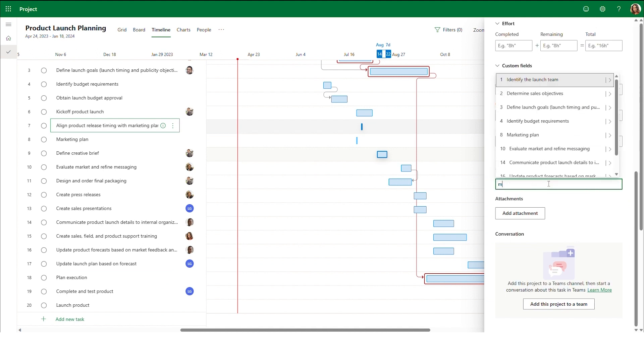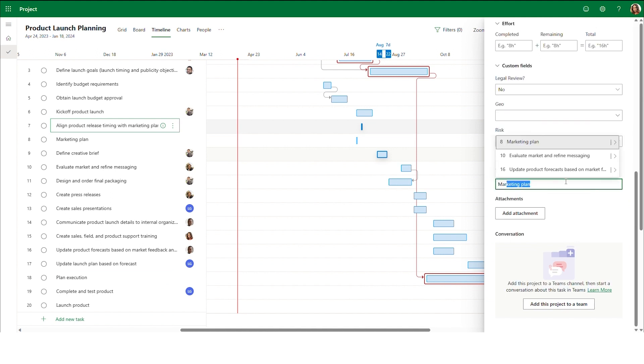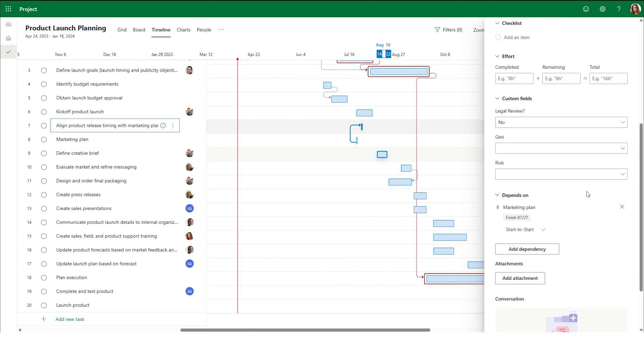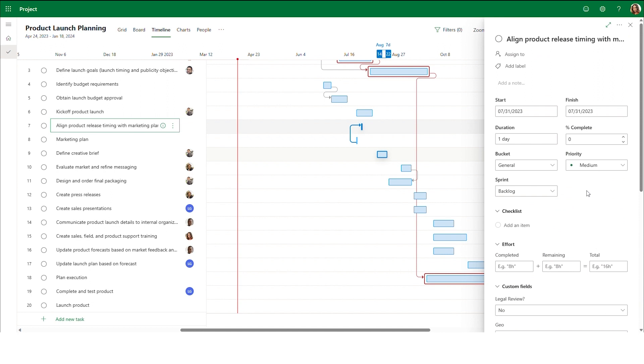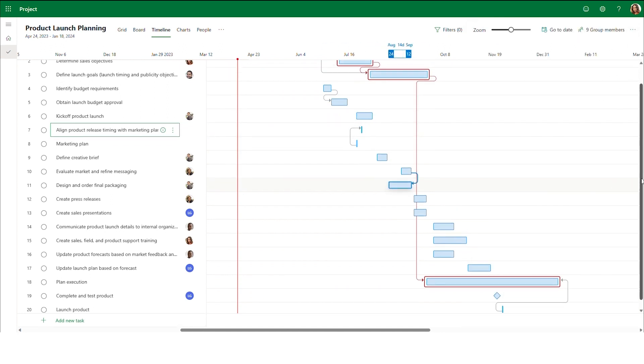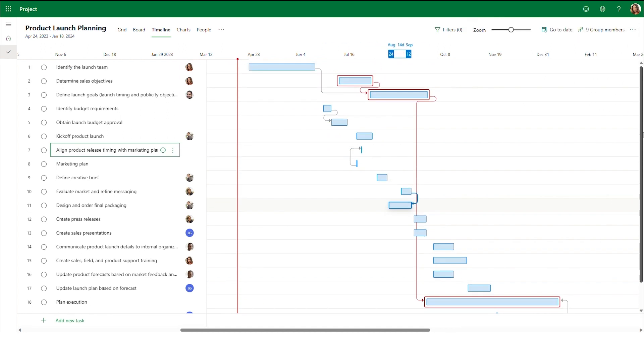The final type of dependency is start to start. With start to start dependencies, the dependent task can only start with or after the start of the predecessor task. Here, we know that we can't start aligning product release timing with the marketing plan until the marketing plan is underway. So we will add a start to start dependency between these two items.